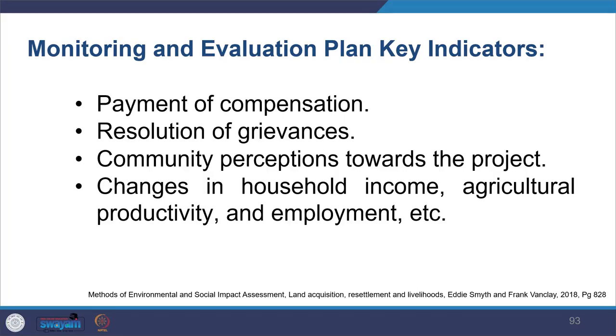So whether the payment of compensation has been made or not, whether a grievance resolution system is there or not, and community perception towards the project, you can regularly monitor that. You can also monitor the change in household income, agriculture productivity, employment and so on. So that helps you. And then in the end, a close-out audit is also required to assess if the RAP, which was developed, has been successful or not.